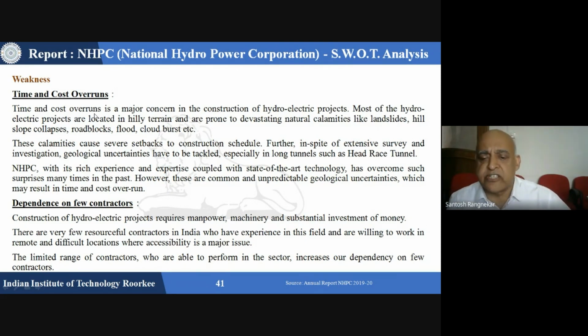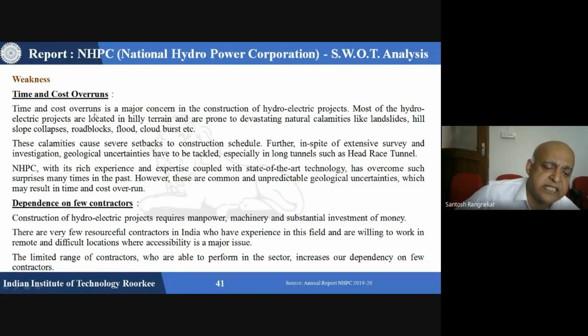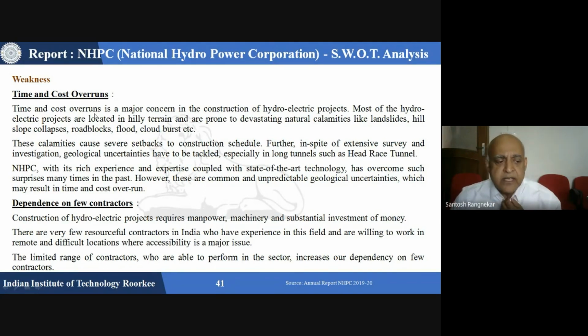Further, in spite of extensive survey and investigation, geological uncertainties have to be tackled, especially in long tunnels such as headrace tunnels. So NHPC, with its rich experience and expertise coupled with state-of-the-art technology, has overcome such surprises many times in the past. However, these are common and unpredictable geological uncertainties which may result in time and cost overrun.